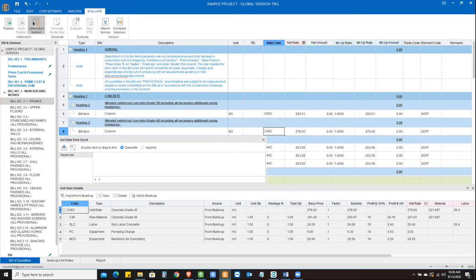So you create many addendum versions, and on the other side, the contractor will then get access to that particular file, because you're sharing through the eTender platform. So the consultant will get a BQS file format, and you are sending out the tender document as BQT format, which is just generate tender document. And then the consultant will apply that specific password like I talked about before, and he would get access to there, and then he would price his things in the eTender platform. It's quite a robust and detailed way of doing it. We might be able to see it in some other session, because of time constraint, I can't really cover that.